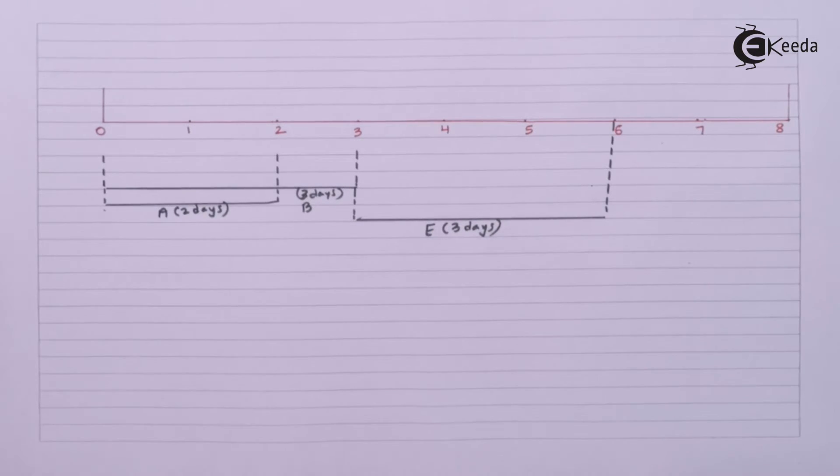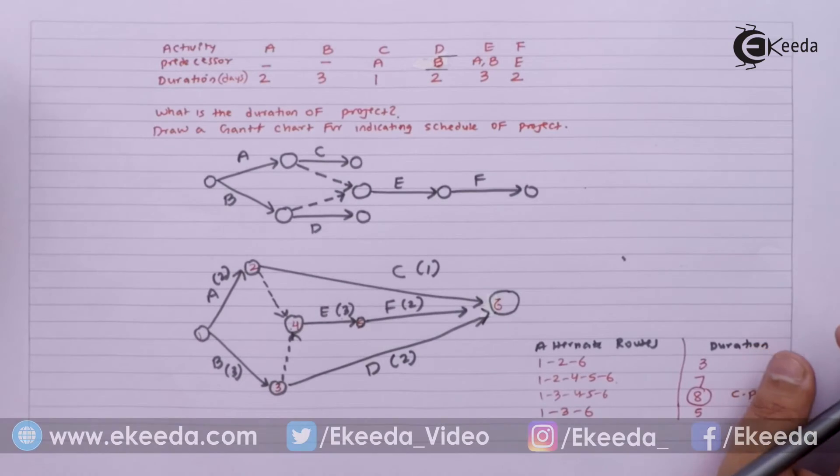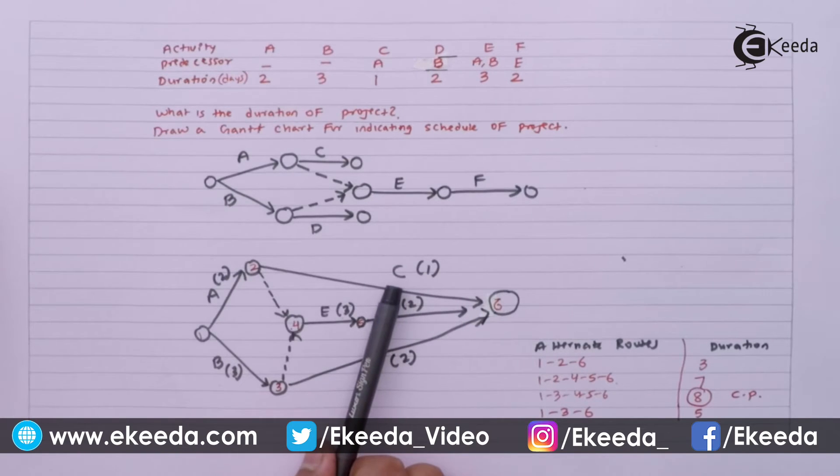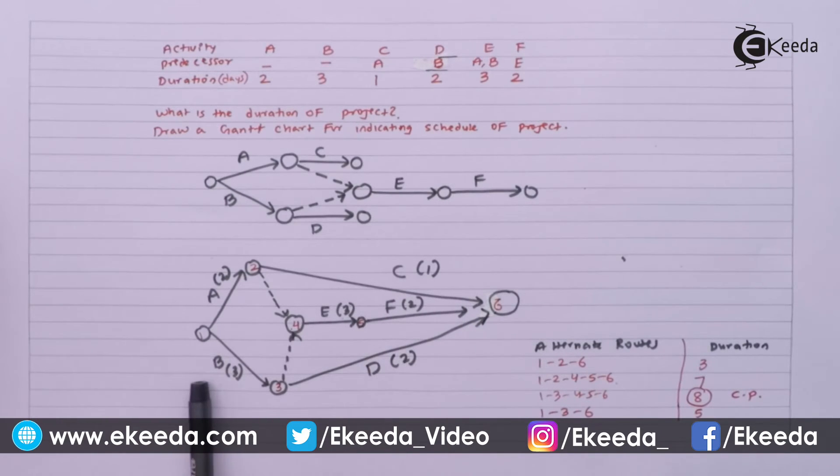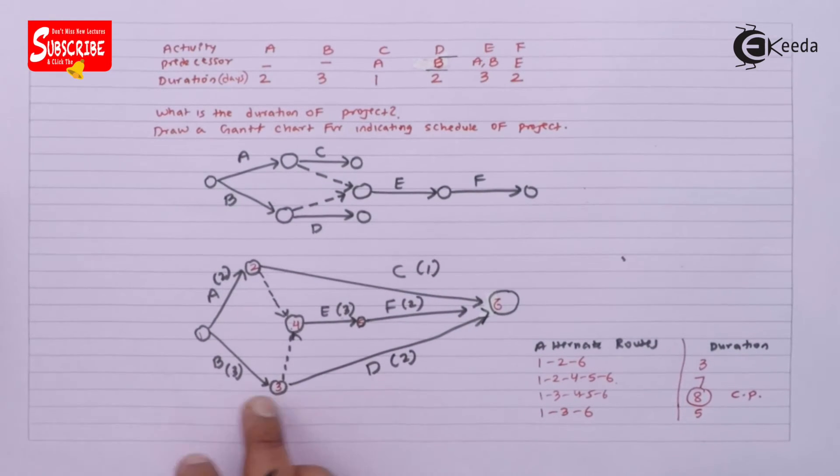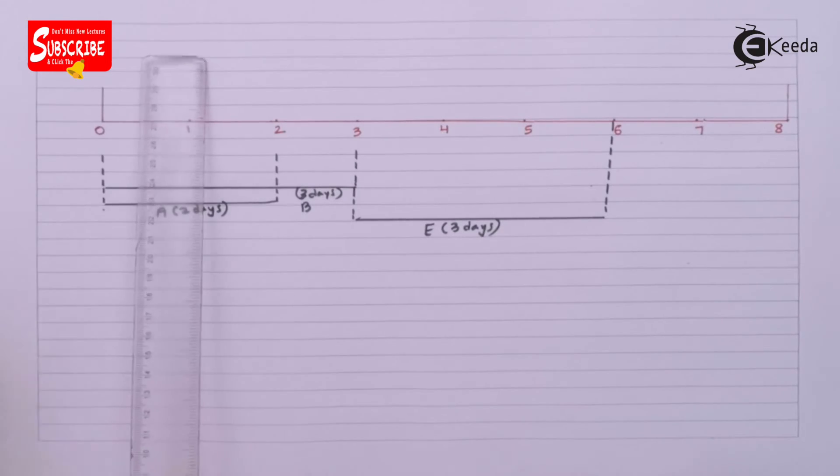In this project we have started on day one with A and B. A will be here for 2 days, B will be here for 3 days. Then A will be finished and we have started E for 3 days. If you look at the diagram again, after A I could have started with C for 1 day. After B I could have started with D for 2 days. So after A, C will be here for 1 day. After B, D will be here for 2 days.